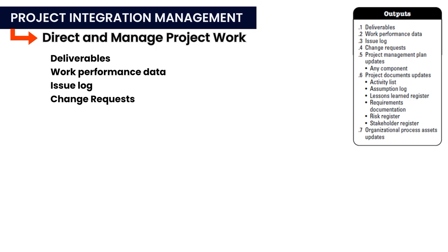Change request. A change request is a common output during the execution, monitoring and controlling, and closing phases of a project. It includes when a stakeholder such as a customer, sponsor, or project manager requests changes to the project management plan. These changes may involve adjusting the scope, timeline, or budget. Change requests address corrective actions to get the project back on track, preventive actions to avoid future issues, and defect repairs to fix broken components. For example, a network switch memory failure during a network upgrade project would require a defect repair.